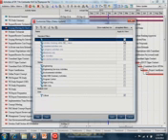So in order to be able to do that, what you would have to do is open all of the projects at the same time. You can only do it from within the activities page, right? So that's a use case where you have 10 projects you're working on, and you want to see all the activities that you're supposed to be looking at over the course of the next 2 weeks. You would have to open all 10 of those projects, and then set that filter to show you the activities within that range.